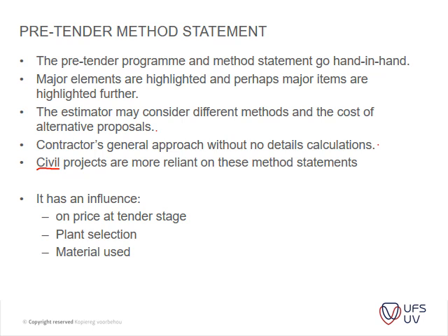Whereas in your civil drawings, you may have a drawing of a building, and it's measured as one item, a pump house, for instance. So the contractor will have to write a whole method statement to enable him to actually price it. Whereas in the standard system, we measure it out. We've got the strip foundation. The QS actually does the method statement for the contractor, in a sense. So just take note that there is a difference between buildings and civil work.